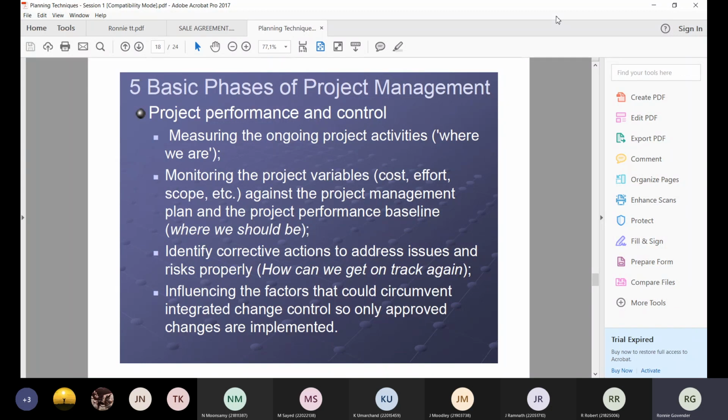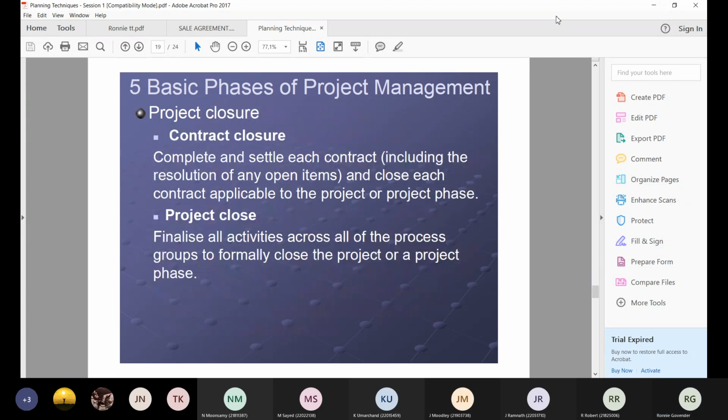They'll give them all the keys to each classroom, show them that the water is working, the electricity, and so on. That's the handover and commission phase, eh? Right, and then project closure is not really a phase, but more paperwork where you say that we've now handed over everything. The site is now given back to the client, and the contractor or the engineer is off that site now.